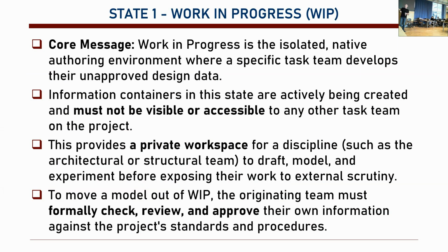It's a linear process. Let's look into work in progress. Basically, it's the isolated native authoring environment where the specific task team develops their unapproved design data. Basically, this is like, as an architectural team, we are working on our own work in progress. And even within architectural team, we can have different work in progress zones.